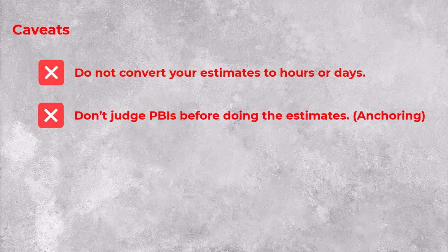It affects the minds of other team members and makes them biased. It is called anchoring, the effect of causing an estimator to simply agree with a non-estimate before estimates are actually called for. For example, this is an easy one.